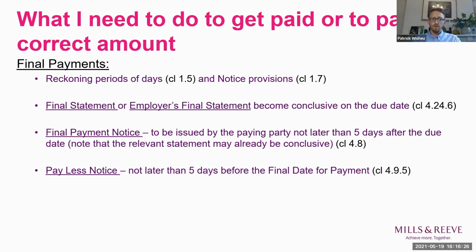And again, it's really important to reiterate that the final statement or the employer's final statement becomes conclusive on the due date. So keep that in mind as to when that is. And if you take any issue with what is included in the final statement, or if something isn't included, raise a dispute and give notice of that. Notwithstanding that you have taken issue with it, you still need to follow through with the rest of the process.